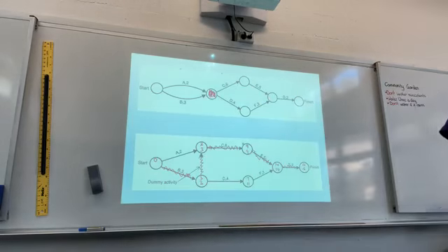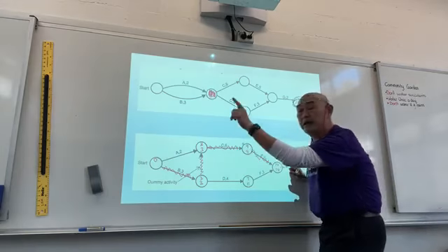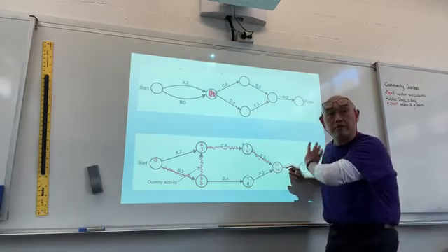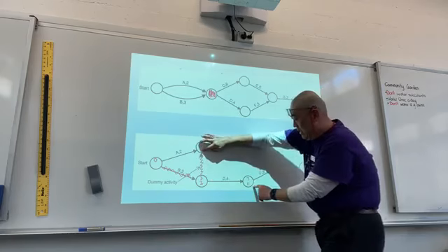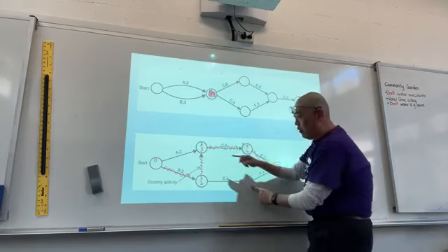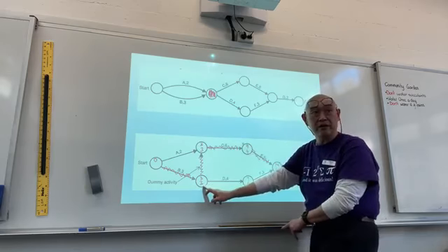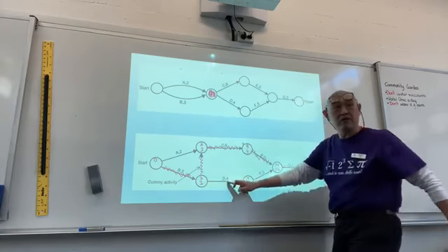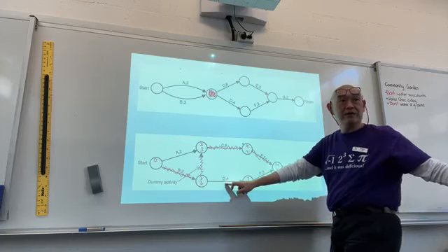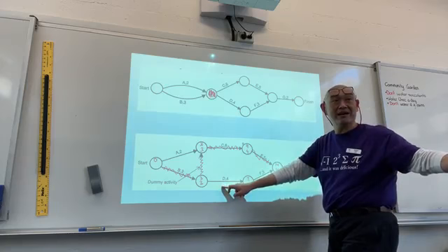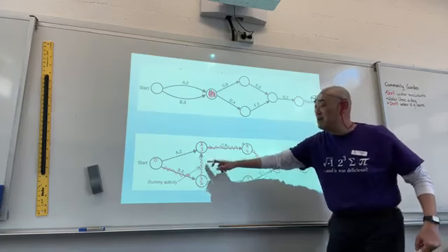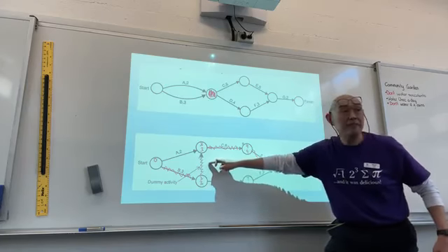Why was the bottom circle on the left 3? Because if you look at the latest starting time, we're going backwards again. 9 minus 6 is 3. Here's 3, correct? So going back to this point, 3 minus 0 will give you 3, whereas 11 minus 4 will give you 7. So you pick the, which number do you pick? So 3. So you must remember the dummy activity, the dummy task.